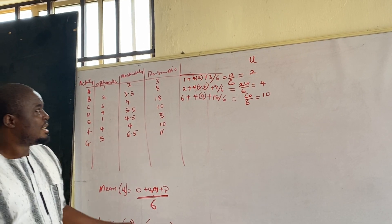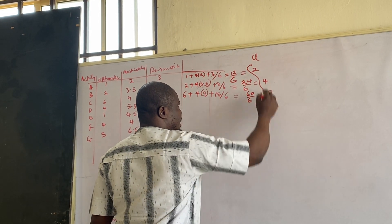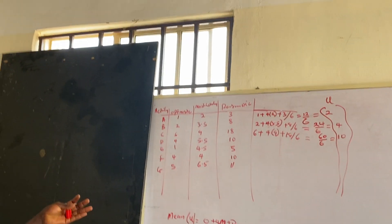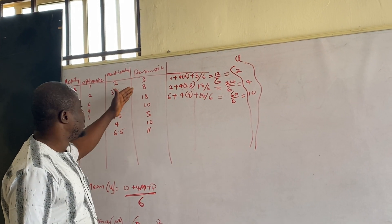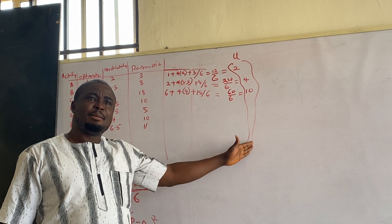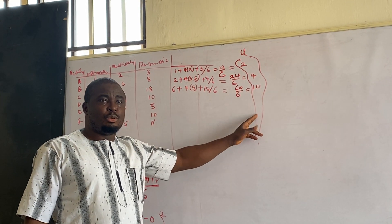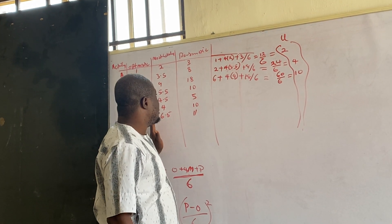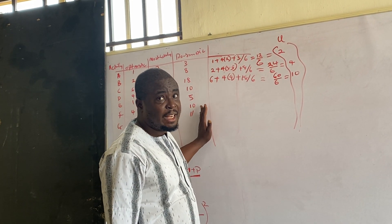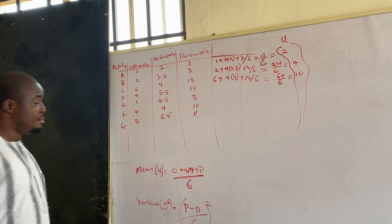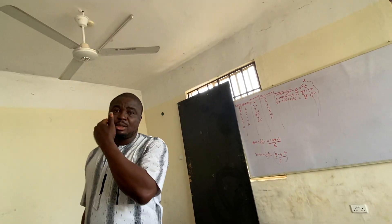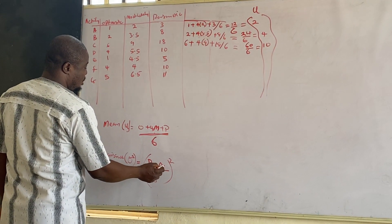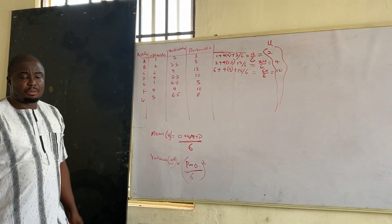This way we arrive at the mean value for all these activities. That is the main difference between PERT and the critical path method — instead of picking a single estimate of 1, 2, or 3, we use these mean values to determine the critical path. The only thing we need to know is how to convert the optimistic, most likely, and pessimistic values into a mean value. If you want to go further — determining how long a project will take or the probability of completing within a given time — then you need to consider variance. Variance is: pessimistic minus optimistic, all over 6, raised to the power of 2.